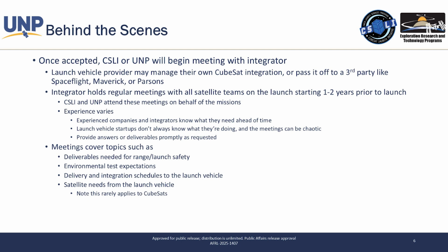A lot of times we're coordinating inputs to make sure that the launch vehicle has what they need to go talk to the range, to the FAA, to get their licensing, to make sure that their safety templates are put together, to make sure your battery testing is up to date. So a lot of times these can be mentor meetings, but they also could be working meetings so that everyone has what they need to do to ensure that you're making your launch schedule on time.